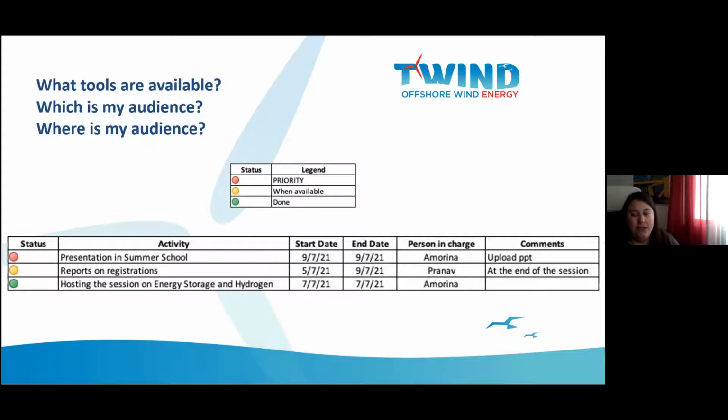Two, to identify the location is also very important. When you're working on a team that is distributed between different countries, working on shifts, and even with some contractors, you have to be concise and clear enough for anyone to understand it. They can't always call you to ask for details, unless you want to be called at 4 a.m. every morning, for example. Even a simple 3-color system to identify stages of each activity could be useful. Sharing information is important, but it also has to be clear. Remember, you want the work to run as smoothly as possible to reduce time and therefore cost.